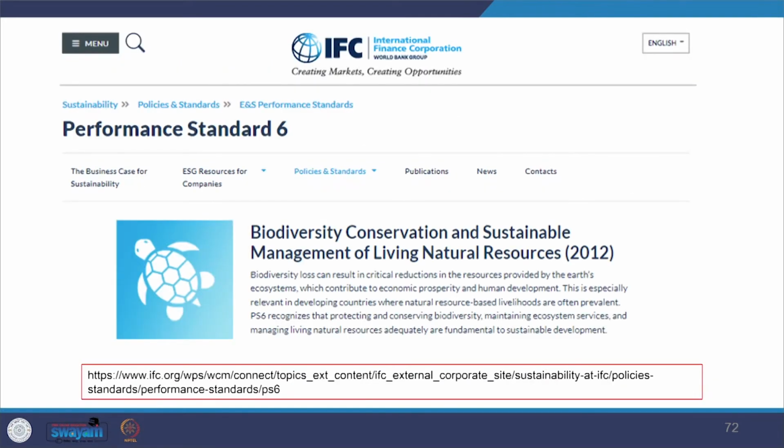You may refer to the approach suggested by IFC Performance Standard 6. It will be important for you to identify a variety of ecosystem services, as some people may depend on many of them to meet their needs. Therefore, you may not screen out services too early in the stage. At the scoping stage, you might retain some of these services. You may also identify services that are on decline and may increase levels of dependency on other ecosystems. If that goes away, then there might be other ecosystems which will have higher dependency.